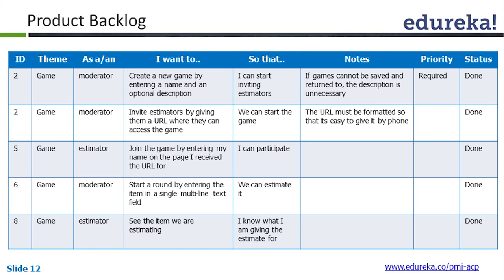For example, if the client comes and says 'I want this immediately' but also wants other things worked on, and the team is already working on two features and the client suddenly wants a third without removing one — the product owner should be able to say: my team is working on two features and doesn't have the bandwidth, so we will not be able to pick that up. At the same time, he should have complete knowledge of the system and should be the gatekeeper of the requirements.